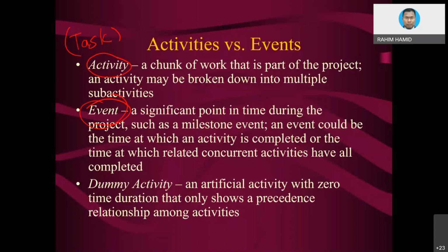It is just the start, but that basically reflects the important event. Similarly with the task named finish. Finish is just to mention that we have now completed the whole list of activities. In scheduling, we call this a milestone. That is the proper name for the start and finish events. Milestone means an important event.